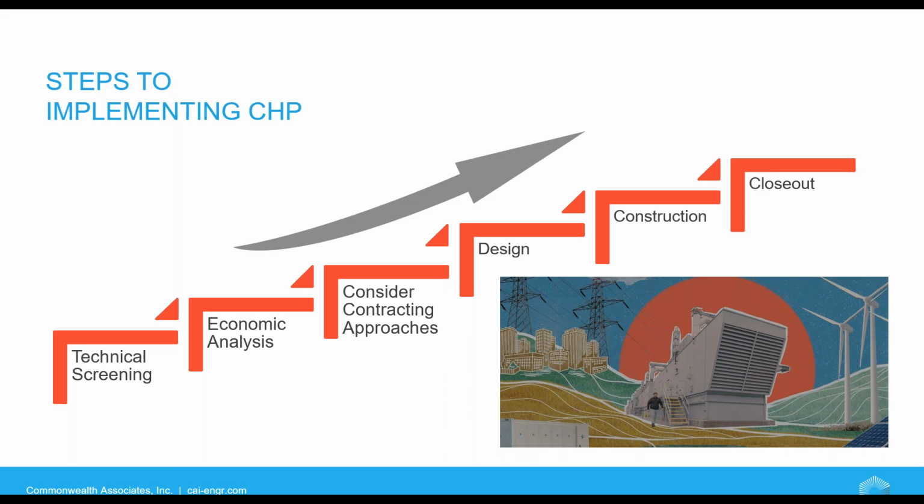But then looking at the contracting approaches, I'm going to approach these at a very, very high level. Traditional contracting approaches: the owner would hire a consulting engineer to prepare specs and drawings, the owner would purchase equipment, and then they hire a constructor. Next would be EPC or EPCM, which is engineering, procurement, and construction management. The owner would purchase a full service company to handle all aspects of the project. And then you have partial turnkey and full turnkey. Those can also be EPC type projects. The owner only has one contract, and they hire one firm to do it all.